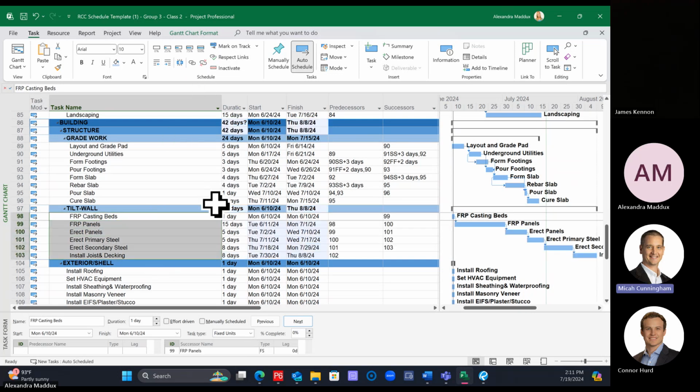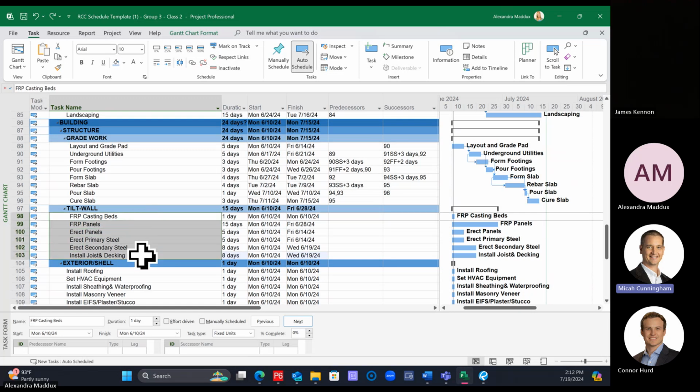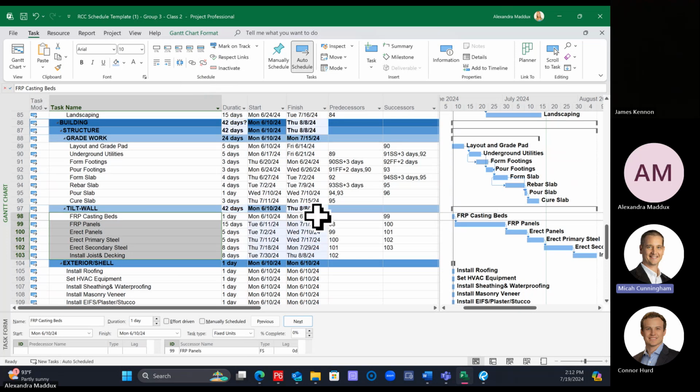The last class, people really wanted to switch it up, so we moved everything and split stuff. Okay, so I just did this shift. I just did all of them, and you can either click and drag all of them, or you can use the shift key and link them together. It's going to do them all finish to start. If that's the way that we're going to do this with no overlap, I feel like we got the overlap with the site utilities and stuff, so we're good there.